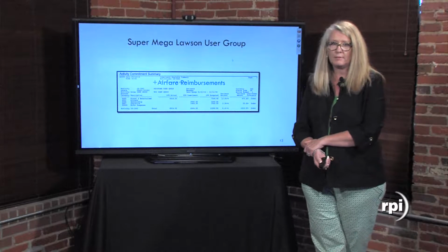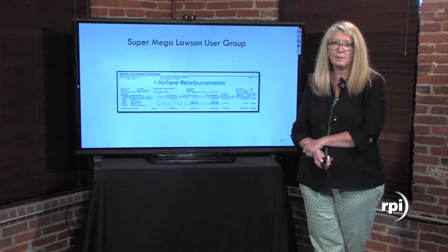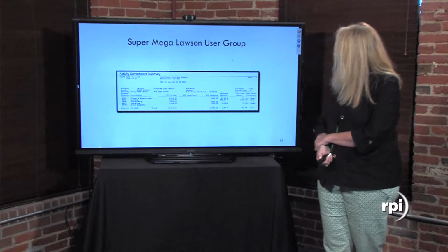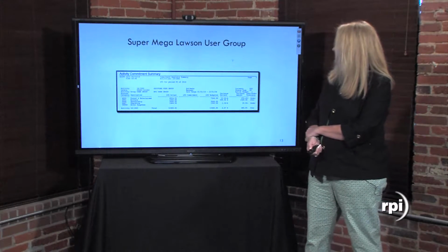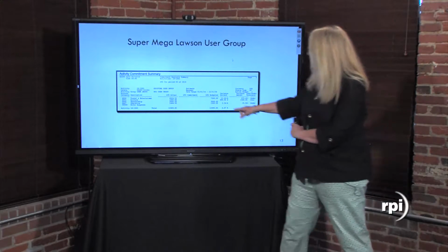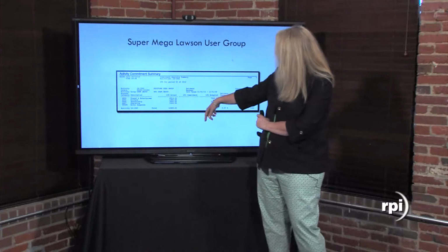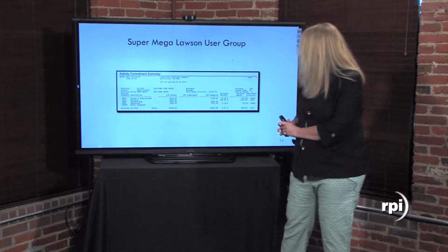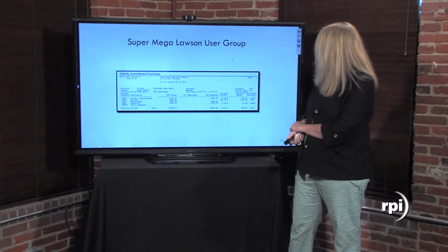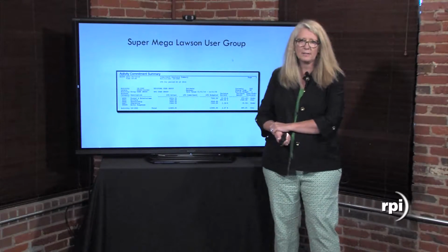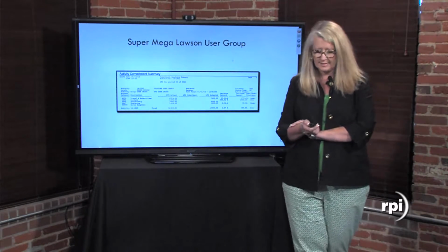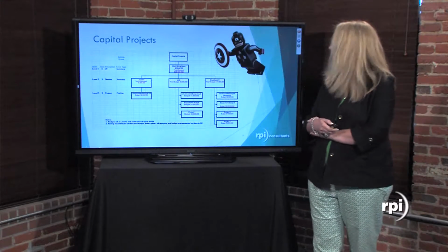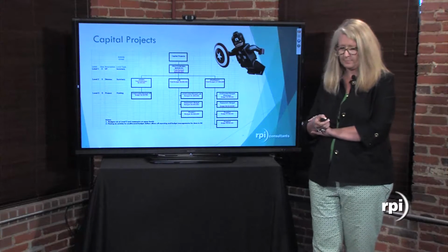Now I also have airfare reimbursements, invoices for sponsorship that are going to come through, and now I run my activity commitment summary again. And you can see now everything's moved from the commitment column, and now everything is over in the actual column. And I can see that we spent $489 more than we budgeted. A very simple example of how you could track things in activity management.